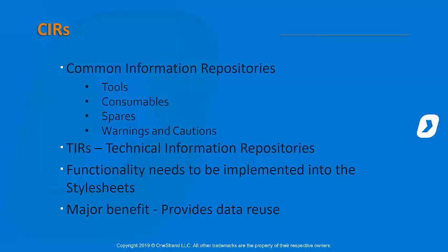Because if you make a decision of, no, we're not going to use CIRs, and then at a later date you go, oh, that's a lot of reverse engineering, isn't it? We're going to implement. You've got to reverse engineer. Yeah, everything you've hand typed has now got to come back out. Correct. So you've really got to understand what the ramifications are of using or not using a CIR. So we do need to understand that and make a concerted effort on what we're doing and how we're going to use it.